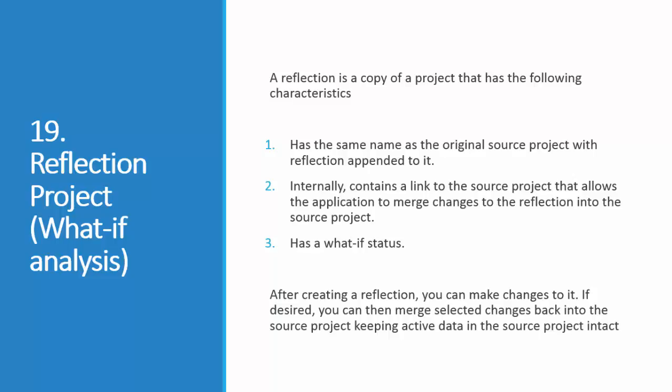After creating a reflection, you can make changes to it. If desired, you can then merge these selected changes back into the source project, keeping active data in the source project intact. This is mainly required for running a what if case. If you like the change, you can merge, or else leave it as an experimental learning.